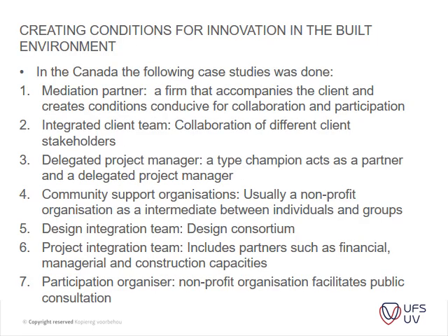Okay, so this you guys have to go through, and unfortunately you have to learn this. This is quite an important slide for me, creating conditions for innovation in the built environment. So in Canada, from the research, they could classify the different stakeholders. So firstly, we have the mediation partner, a firm that accompanies the client and creates conditions conducive to collaboration and participation. That is now an advisory to the client.